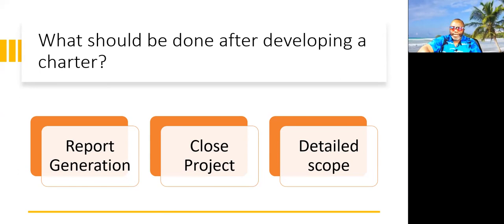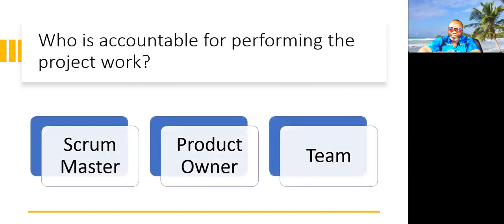All right, 3, 2, and 1. You don't need that much time because you just looked at something similar. So let's think about it. You're done with the project charter. Do you close out the project immediately? No, you don't. Do you immediately begin to generate reports after creating the charter? Or would you first of all work on detailed scope, which happens in planning? Yes, you would. You would do the detailed scope. So the answer to that is detailed scope. All right, let's go to our next question.